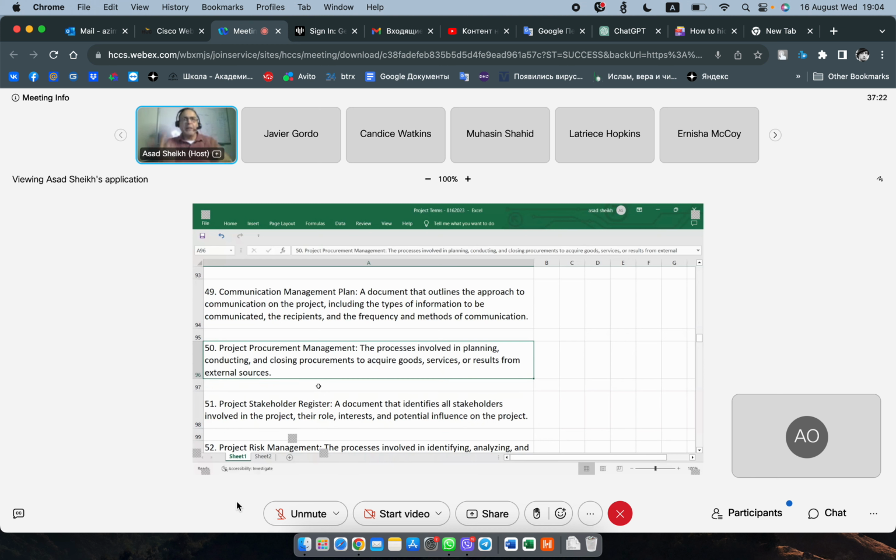Even though you're meeting with them, let's say twice a week or once a week, at the end of the week on a Friday, you should put together what was accomplished this week, what they're working on, and what the next steps are. Minimum three things: what they accomplished, what deliverable they completed, what they're working on up to now, and you can include a week or 2 weeks. I think it's weekly, and then what's coming up next week. So it's good to do that.